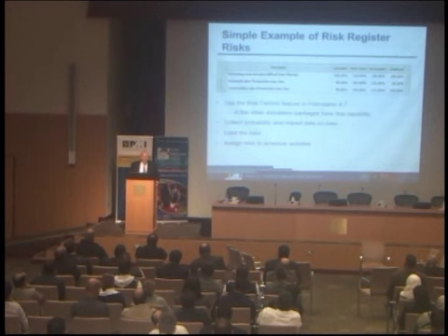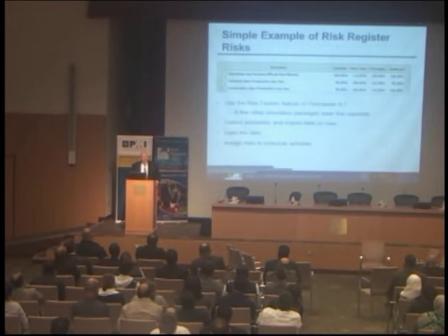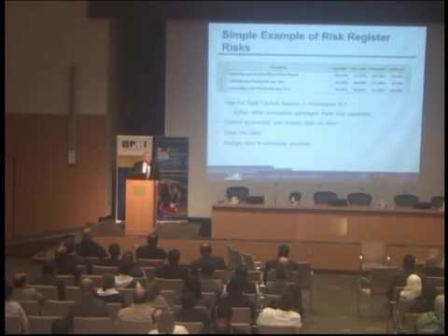Funny thing, when I interviewed for risks, and I was still using 3-point estimates, I got the most likely durations, and I put the most likely durations into the remaining duration column, pressed F9 on Primavera P3, and got 40 months. In other words, the people literally did not believe that they were in the upper quartile of all companies that do this kind of work. And my risk analysis said that it was actually 45 months at the 80th percentile. So I made my report, and they said, wait a minute, it can't be 45 months because we have a 32-month schedule.